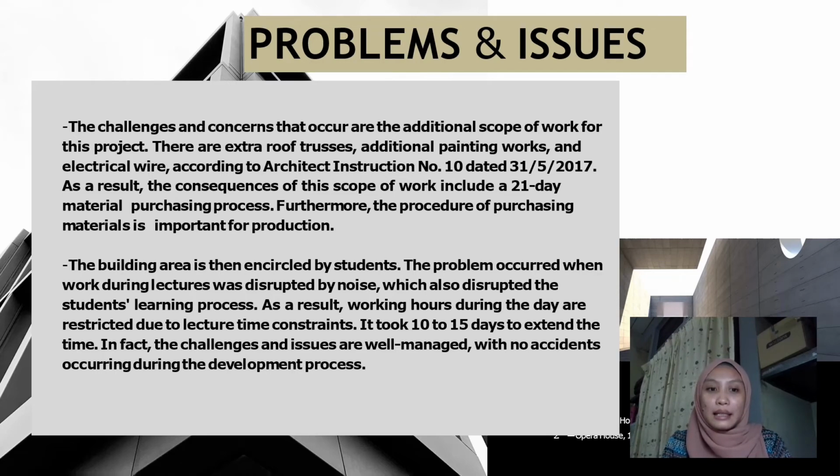Next, the building area is encircled by students. The problem occurs when work during lectures was disrupted by noise, which also disrupted the students' learning process. As a result, working hours during the day are restricted due to lecture time constraints. It took 10 to 15 days to extend the time. In fact, the challenges and issues were well managed with no accident occurring during the development process.